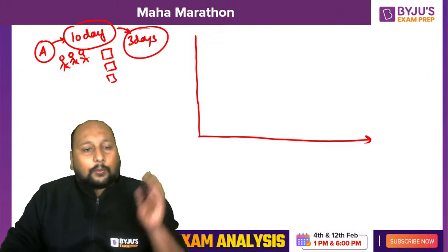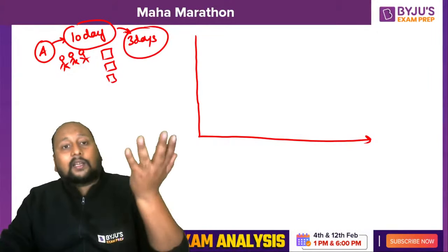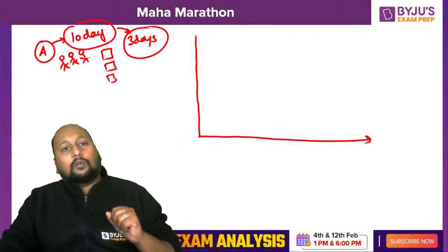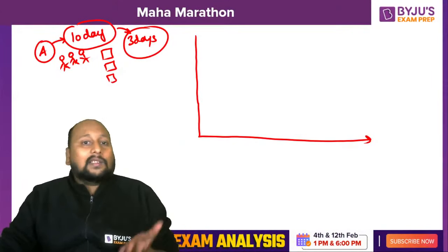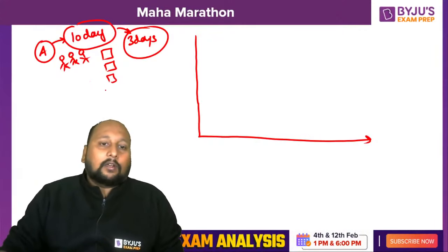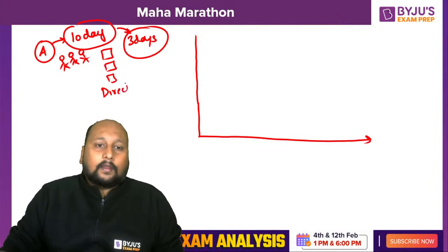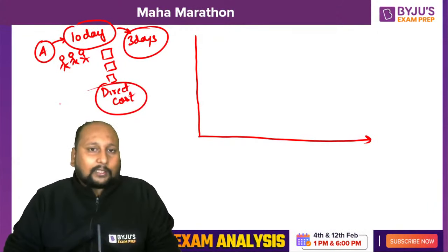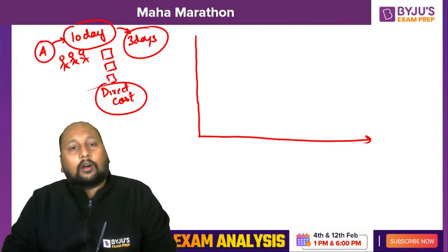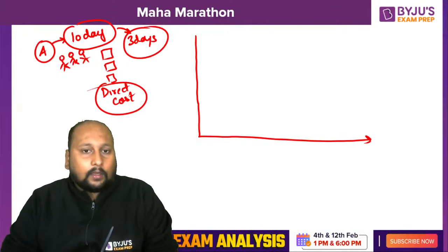Okay, so in this process in which I have increased the resources, what has happened is I'm increasing the cost, and that cost is basically the direct cost. That is basically the direct cost. Is it clear now? Crashing is always being done on the direct cost. Okay, fine.